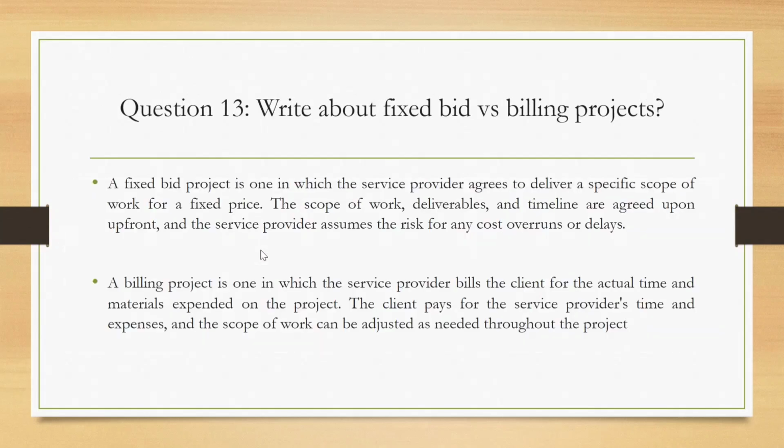And coming to this fixed bid and billing, in a simple way, I will explain. Fixed bid means the time, the budget, and whatever requirements are there, they are all fixed. Okay. And here the client will be on the safe side, and the organization will be at risk, it will be facing risk because the client will be giving the budget and time.